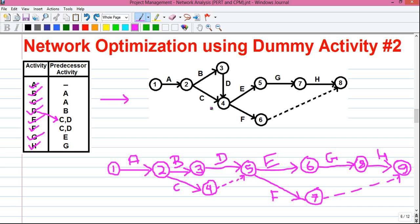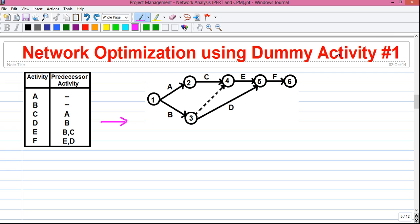So if you follow this procedure, not only can you draw the perfect network at one shot, but also you can save time during your exams. By removing this dummy activity and connecting activity D at this point, you can make the diagram more compact and can save an event. I hope I was able to make you understand the concept. If you are still confused, then please watch my previous video, Network Optimization Using Dummy Activity Part 1. That will help to clear your doubts.